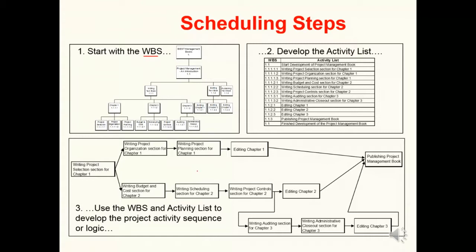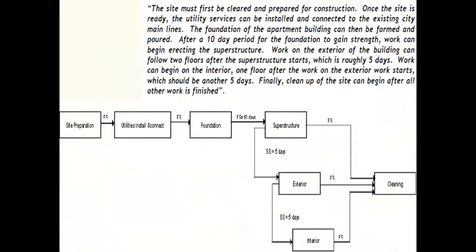As a quick recap of previous discussion: we start with a method statement or client requirements. Here the method statement stated the site must first be cleared and prepared for construction — that's the first activity, site preparation. Once the site is ready, utility services can be installed, which has a finish-to-start relationship with the previous work package. Then the foundation can be formed and poured. We convert this logical description into a network diagram, indicating relationships. There are different types of relationships — finish-to-start and start-to-start — and two others we'll cover today.